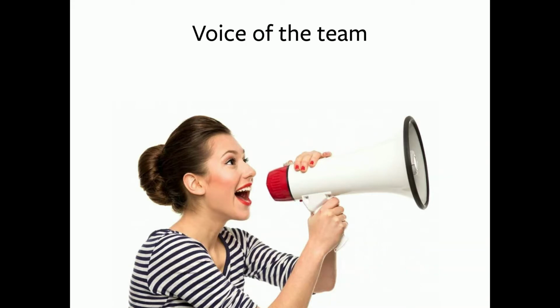Now, when you're going into it with a client, they're going to tell you their pain points, and it's important to note, don't think that you have to give them a solution right then and there. It's something that you want to listen to, talk through, ask as many questions as you can to figure out what exactly the pain point was, and then ask them if you can have a follow-up meeting either in a few days or at the end of the next sprint, and then make sure you have that meeting. Because you want the client to know that you're serious, that you're going to have the meeting, that you're going to try and solve the issue. And there's, again, just doing things to build that trust with the client. Knowing that your word is good. If you say you're going to have a follow-up meeting, you will.